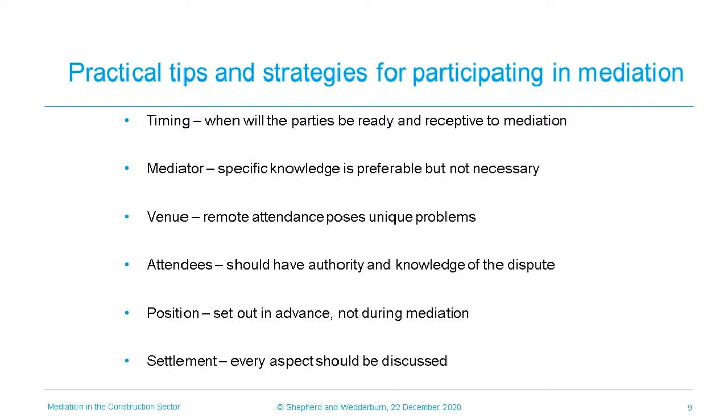This being said, obvious conflicts of interest should be avoided, and you are well within your rights to object should this be the case. Again, given that the mediator is not a decision maker, it is not as necessary that they have an in-depth knowledge of the subject matter, but more that they can demonstrate an understanding which will be beneficial when dealing in a highly complex area. In such complex disputes or where there are multiple parties, it can be useful to employ an assistant mediator to ensure that things run smoothly.